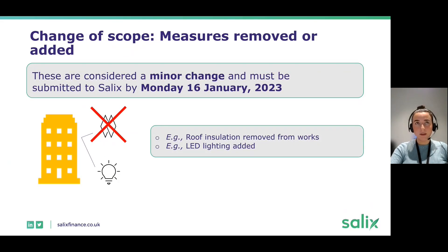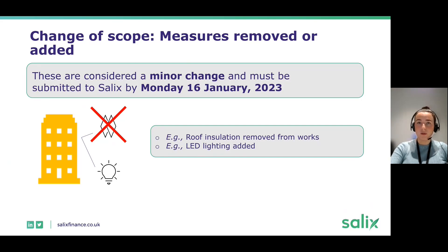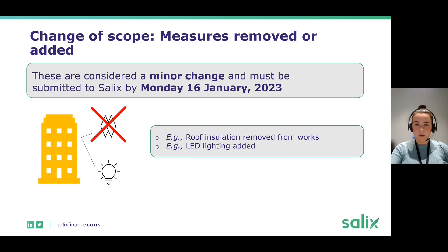The changes that are still being accepted are considered minor changes, which include removing or adding energy efficiency measures to the project. For example, removing existing roof insulation or adding an LED project alongside other measures is fine. The deadline for these changes is the 16th of January, after which we'll no longer be assessing those types of changes due to deliverability by the March 2023 deadline.